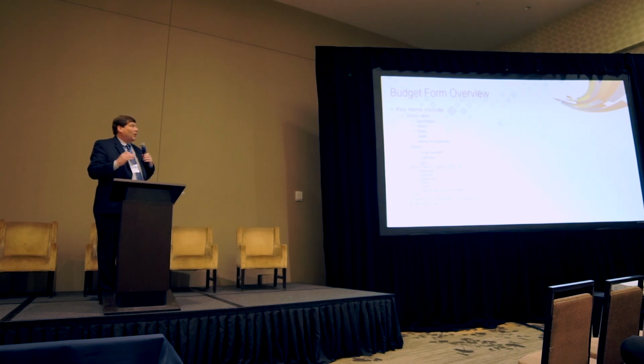Make sure that all the proposed costs are allocable, that all these items and services are needed for the performance of this particular contract, not any others, and that all costs are allowable, meaning all the costs are permitted by federal regulations. We also have to comply with the NASA FAR supplement, NASA policy, and procurement guidance, and also, as Kate mentioned, the SBA policy directive.